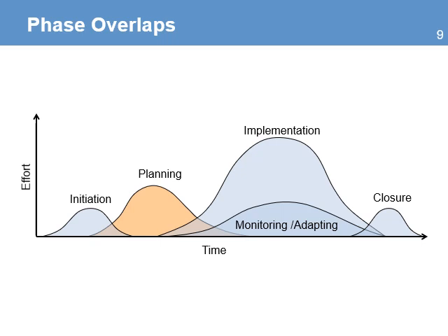Let's look at the planning phase again. In the project cycle, we identify the planning phase as going through this cycle in which there is a lot of effort happening during the phases between initiation and implementation. The planning phase starts before the initiation phase is complete and might extend well into the implementation phase, where you're going to be improving your plans based on the information and lessons you collect during the implementation phase.